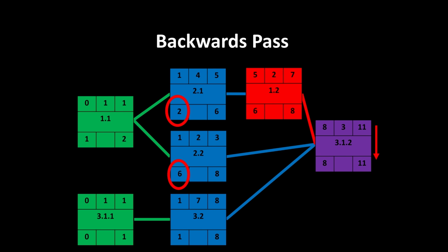In this case, when we're going backwards, we pass the lowest number. If you make a mistake and pass the highest one, it will quite quickly show that you've made an error there. But we want to pass the lowest one, so the latest we must finish this one is 2, and then again we've got a 1 duration in this green box, which means the latest we can start it is after 1 day. So we now know the earliest and the latest we can possibly start every single one of these tasks here.